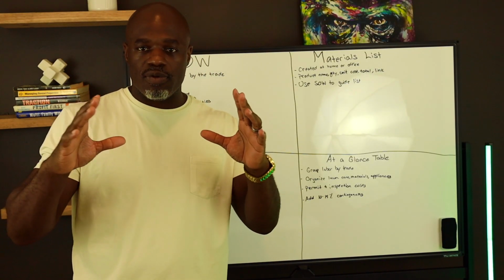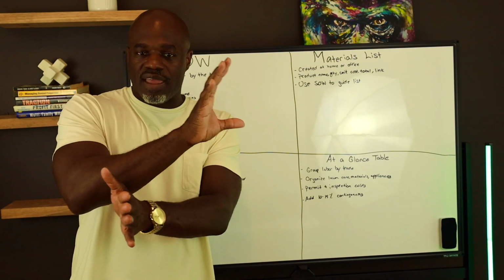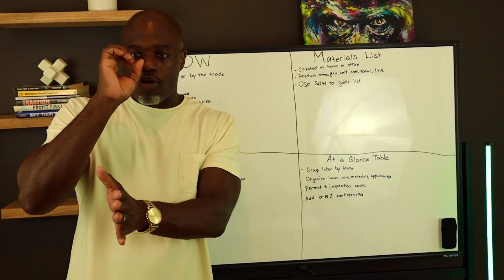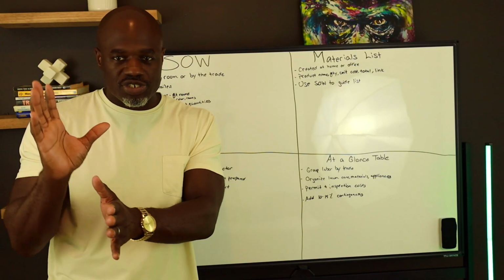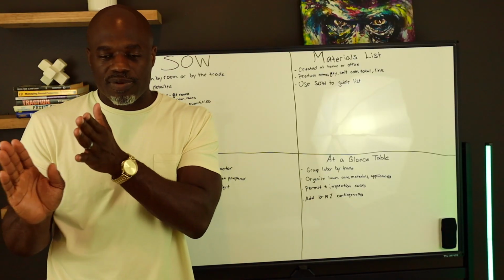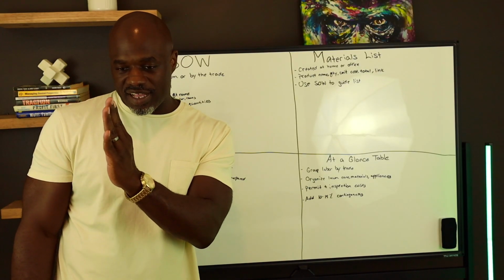I have that table. I keep my liability on the right side, and then whenever I pay the plumber, I'm all done. Then I'll mark it to a zero balance. I owe plumbing $0. The electrician $0. He's done. I paid him. The carpenter $0. I paid him. And as we go down, right? So I still got to pay so and so.